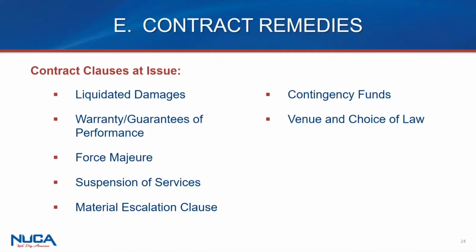Force majeure, I want to quickly talk to you about that, in that it usually, as we've referenced, gives you time, not money. Your standard force majeure clause is all about defining these events of God that give you time and not money. Money may not be it. Look out for clauses for suspension of services.